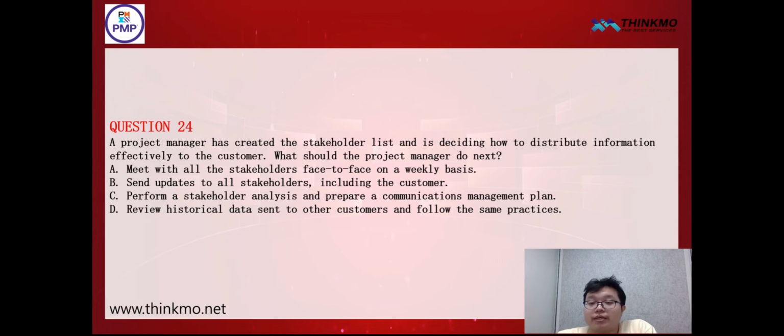Now, option C is to prioritize the additional features and put them on the backlog for the next iteration. As for option D, it is to inform the client that these new features will be added in later stages. All right. As for options C and D, basically, both of them are kind of adopted, but neither is implemented immediately, right? So which one should we choose here? Let's first analyze options C and D. In this situation, as the project manager, the first thing we should do is inform our client that the request has been received. And then, in the next iteration, we can prioritize it.